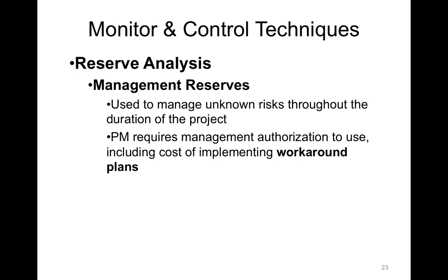So the project manager is not bound to those risks by funding them through the contingency reserve. They use management reserves to do that. So you would never see an unknown risk in a risk register. You would never see an unknown risk in a contingency reserve. That's just money set aside to deal with the realities of life, which is managing unknown risks.